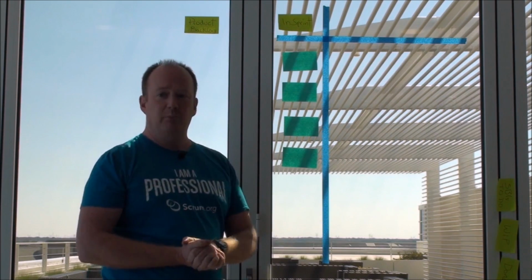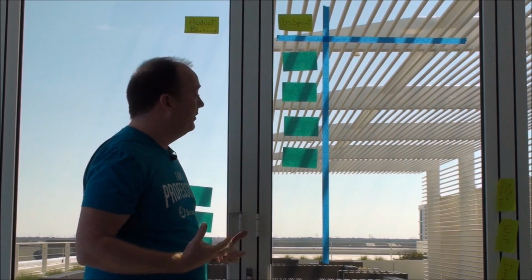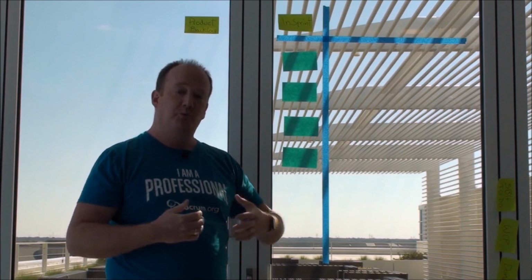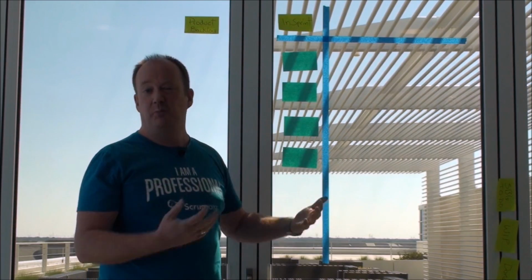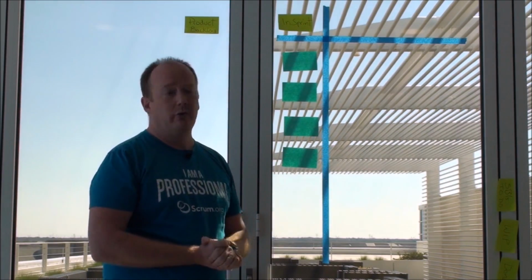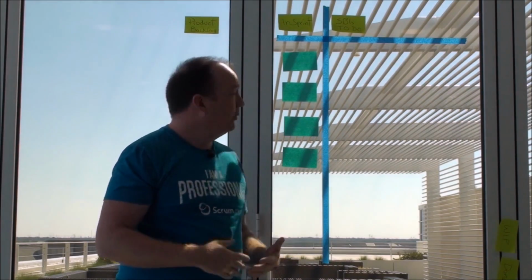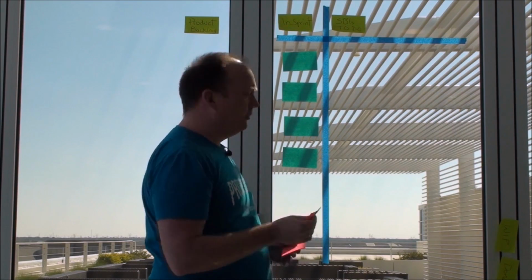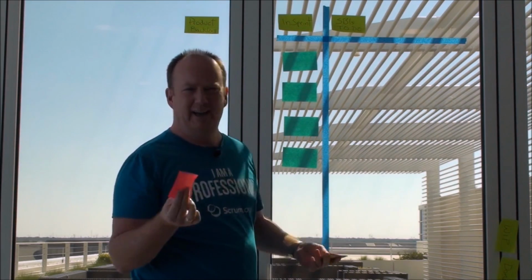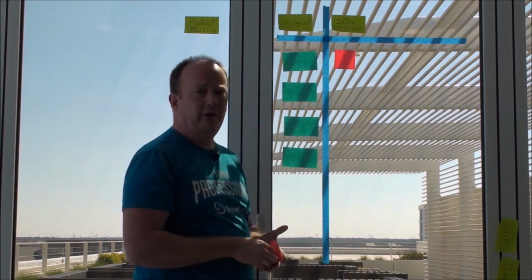But then we move on to the second part. So they might take a break at 10 a.m., they come back, and now I want to visualize what the next step is. So the next step is for them to break this down into sprint backlog items, which are just smaller decomposed product backlog items. These can be tasks, smaller stories if you're using user stories. But really what they're trying to do is figure out what the sprint backlog items that they need to do are within the sprint. So when I visualize this, I like to use maybe a smaller sticky, just to show that they're smaller breakdowns. The Scrum Guide suggests something like a day or less. So their next job for the next 2 hours till noon is to fill these in.